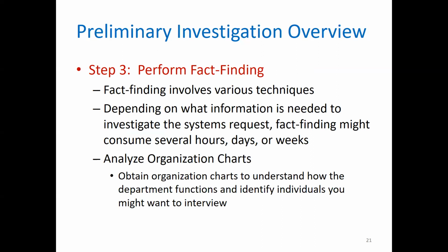Step 3, perform fact-finding. Fact-finding involves various techniques. Depending on what information is needed to investigate the system request, fact-finding consumes several hours, days, or weeks. Analyze organizational charts. Obtain organizational charts to understand how the department functions and identify individuals you want to interview or to communicate with.